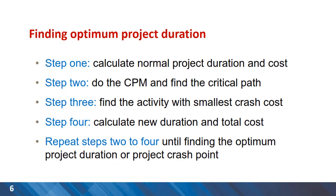We can follow these steps for reducing the duration of project crashing and step 3 is very important to find activities with the smallest crash cost that we discussed in the previous slide.